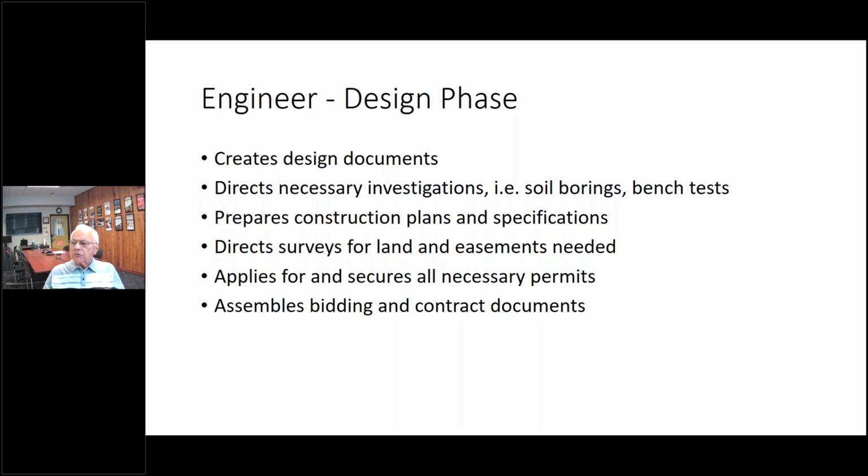In addition to construction specifications, there are required contract documents which vary with the different funding agencies. However, basic documents include general and project-specific conditions, bonding and insurance requirements, forms for the contract payment requests, and change orders.